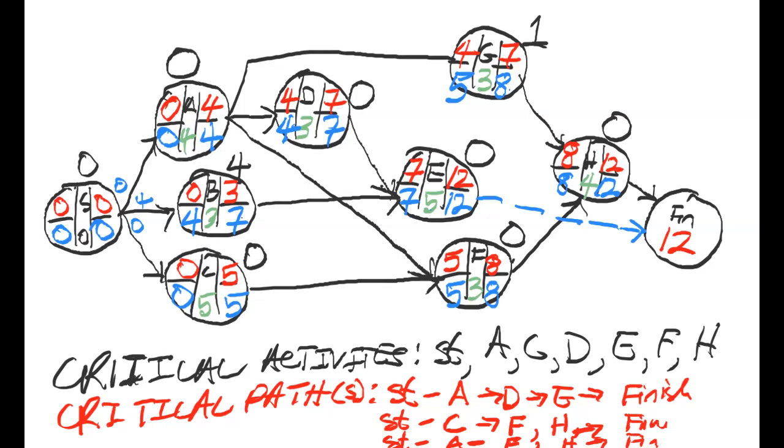All right, good. So notice the use of the English. Which activities can be delayed? Well, activities B and G have non-zero slacks. Therefore, activities B and G can be delayed. Which activity can be delayed the longest? That's activity B. For how long? For 4 days. All right.